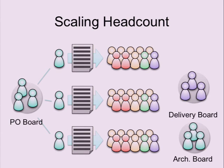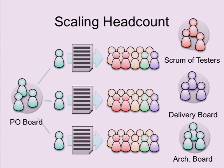And now the important part: there's also a Scrum of testers. So all testers meet on a weekly basis and talk about test issues. Partly they exchange their experience, but they also coordinate test efforts. For example, if you do release testing or acceptance testing of releases, it doesn't make any sense that every team actually tests all the features. So we can avoid redundancies if the testers of the teams coordinate with each other and focus on special areas while executing, for example, acceptance tests.